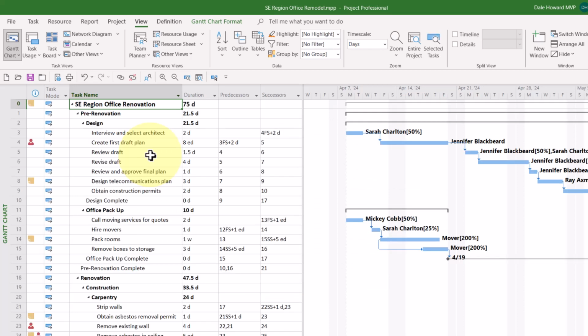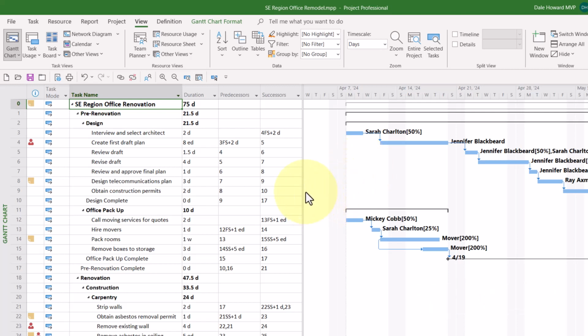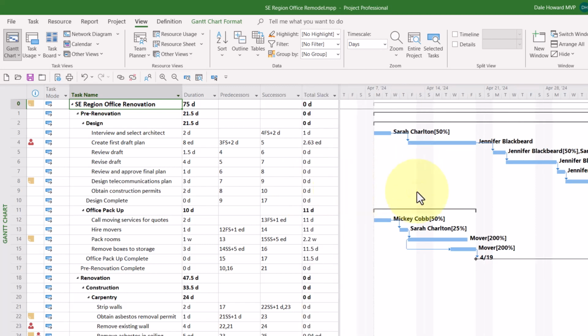Well, let me just say that years ago, I did some research on how to locate tasks that use elapsed durations. And to my delight, I discovered something quite unexpected. That is, when a task has an elapsed duration value entered, the total slack value is then calculated using an elapsed duration.